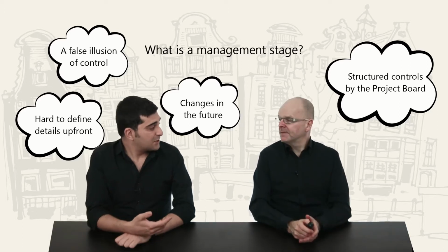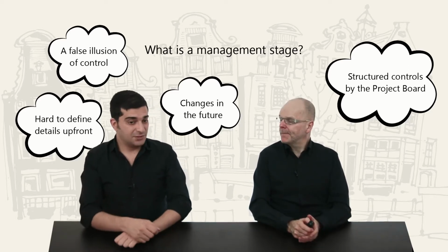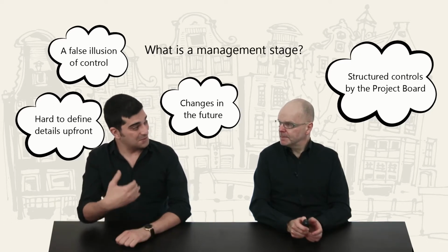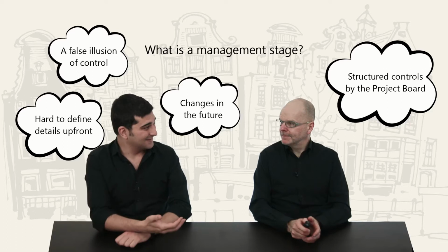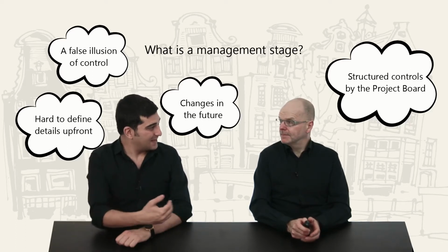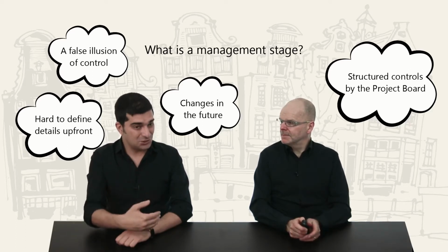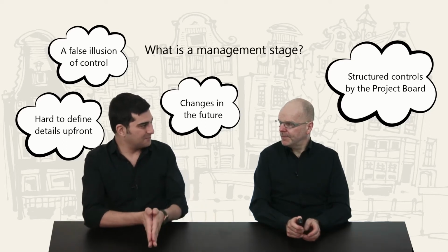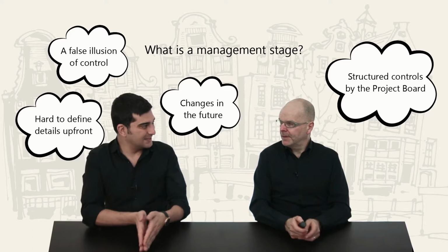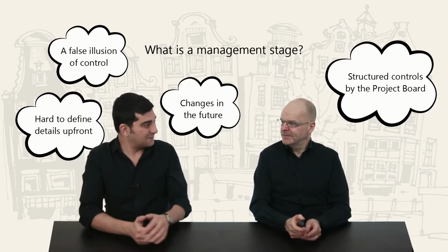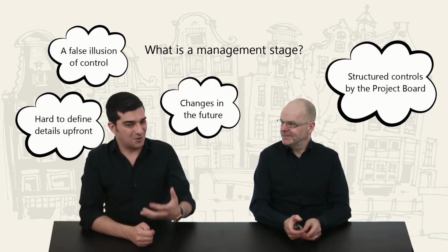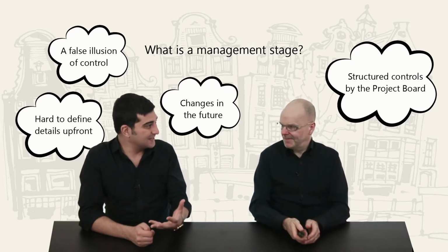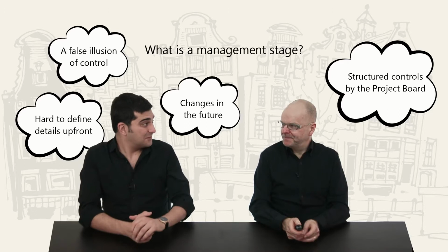Or for example, most project managers have a funding problem. They don't have enough money. The money that they were promised in the beginning doesn't arrive in the project. But when we have managed by stages, each time we go there, show them the plan for the next two months or three months, for example, say that this is the money we need, this is what we will create, is it fine? And when they authorize, part of that authorization is that they commit to provide you with the funding you need. So that may prevent many of the problems.